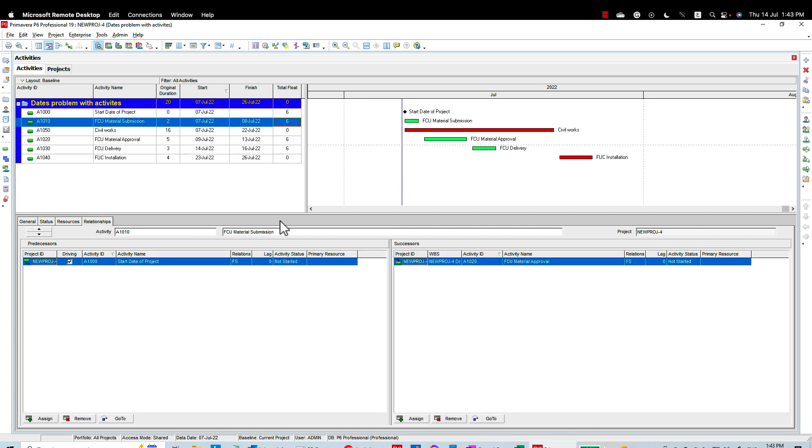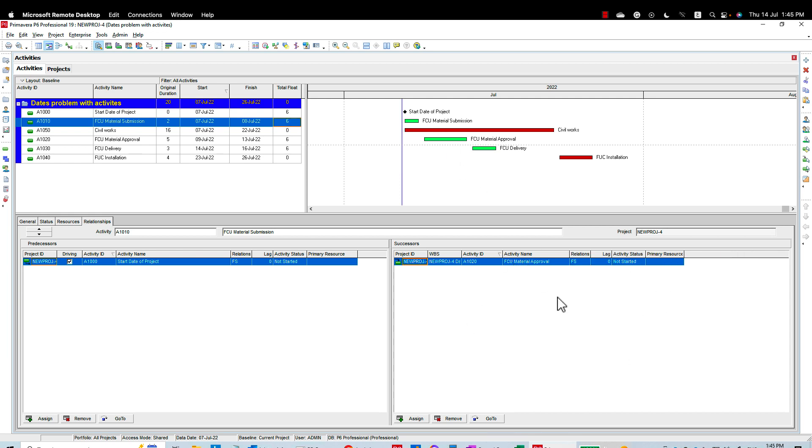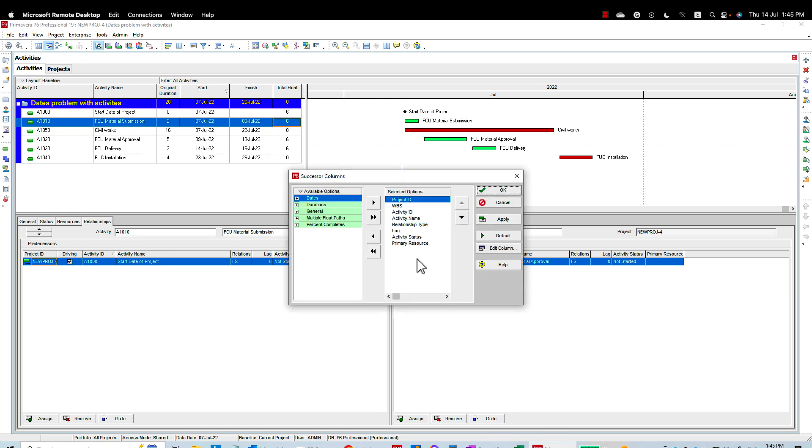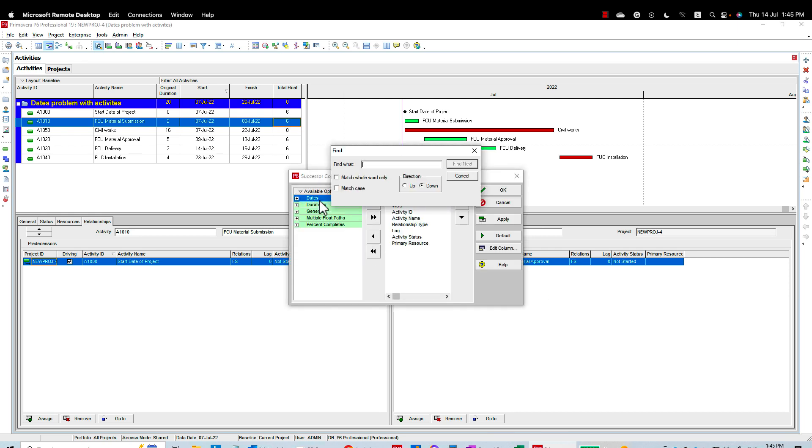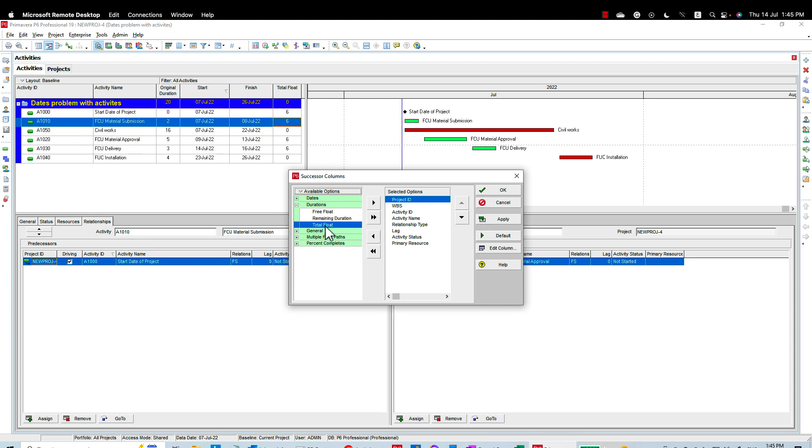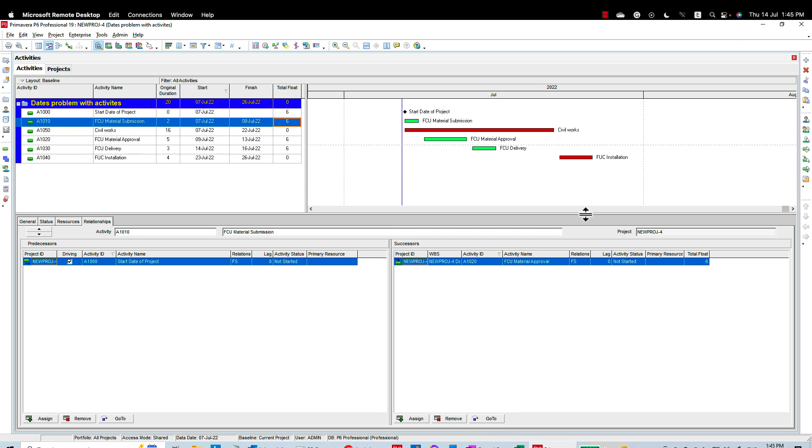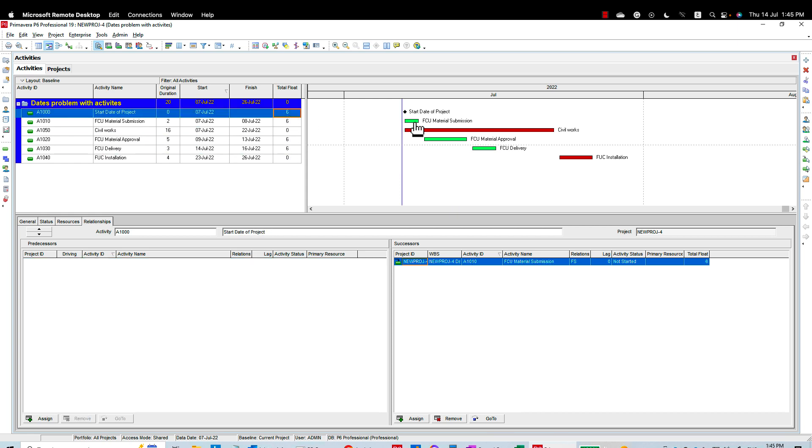Okay, I have here the material submittals. If I check the relationships, this is linked start to finish to start with the project start date. Now from here I can see that the material approval is linked as a successor to the material approval. So I will add here one more column which is the total float. By adding the total float, I'll be concentrating on how many days I can delay this activity without impacting the project. The first method to reduce the float - I have here these six days.